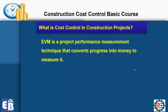EVM is a project performance measurement technique that converts progress into money to measure it. As you know, when you compare two things you need to compare apples to apples — you need to convert all your progress into a similar term or condition for comparison. EVM uses money as that common term or condition of comparison, but this is not the case in cost control.